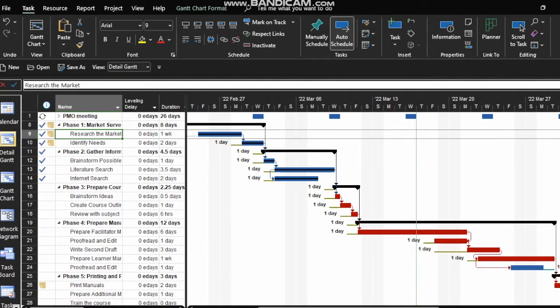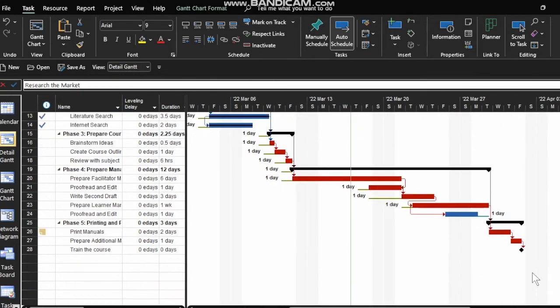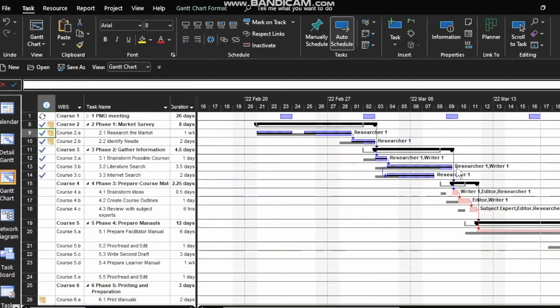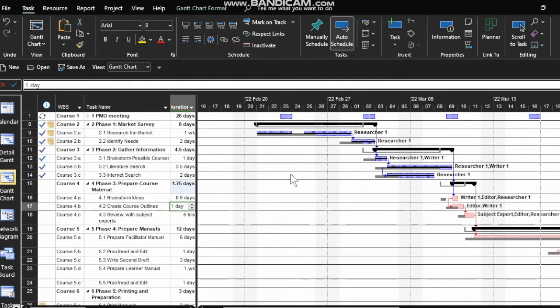What else are we discussing underneath schedule? Well, as a project manager, even though it seems we're going to be back on track by the end of the project, I'm still wanting to pull these back 1 day. So what am I going to do? We're talking about things going forward, and I want to pull these back. I can change the relationship. If I double click there and change the relationship to a start to start relationship, we pull it back.